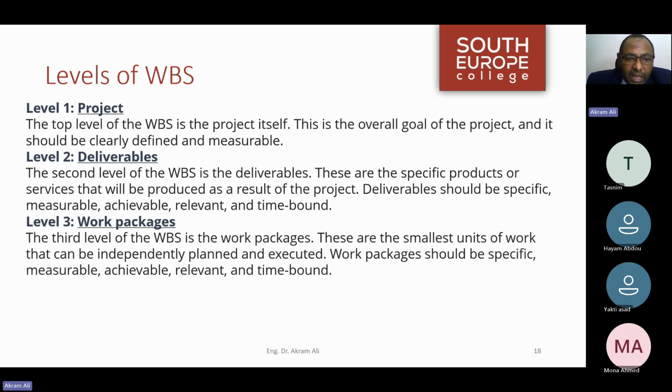what I mean by a project level is I will divide my project into big components. For example, I am building a university. So the main components of such a university is a utilities area, a recreational area, and an educational area, plus a small sports area. So it is mainly divided into 4 areas. So when I start to say my project is divided into 4 areas, this is level 1 of my project.